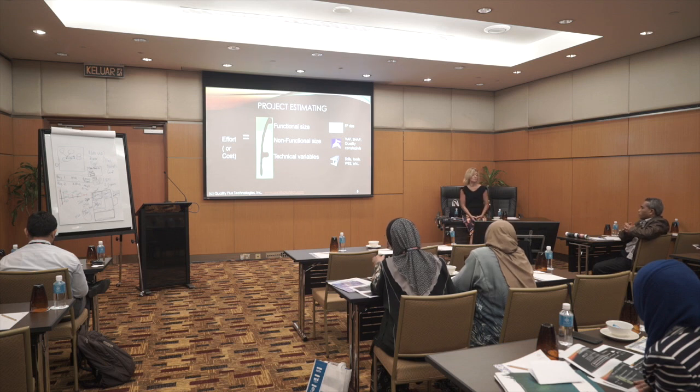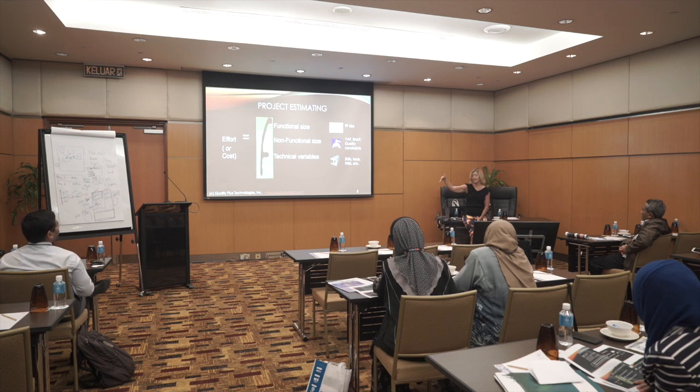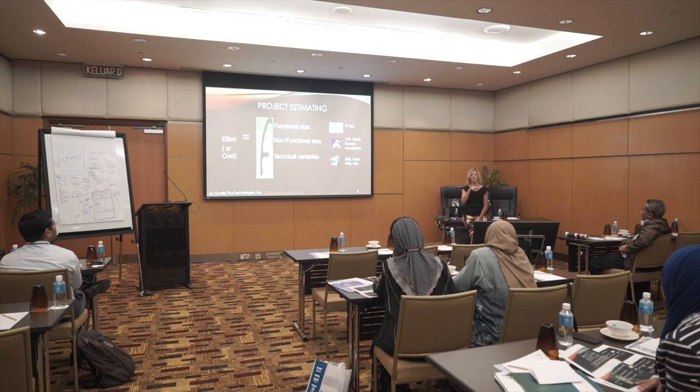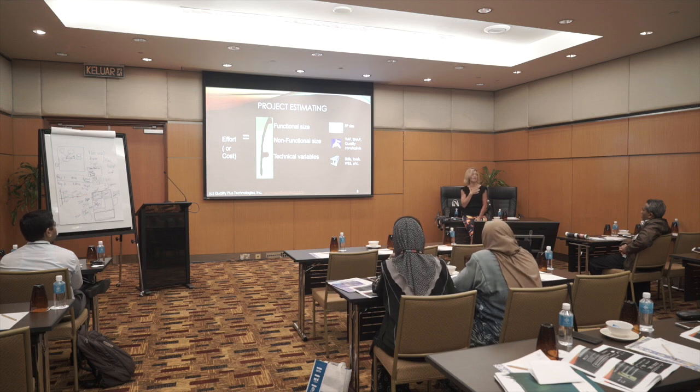The estimating tools will tell you, here's the kind of range that you're doing. And it makes a difference who you are. If you are the supplier, pricing is different than costing. Costing says, what will it take me to build this? Pricing says, what should I charge you so I have a good assurance of profit? So if all of my materials add up to $100,